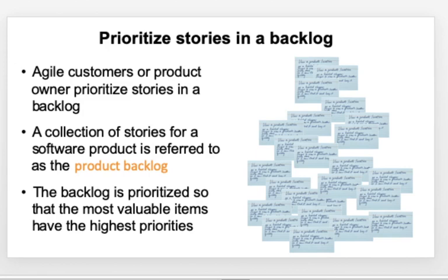So after you have written all user stories, the next step is prioritization, because all of the user stories that you write go into what is called a product backlog. I have mentioned it is a bigger bucket, so you will not be able to pull out all items from the bigger bucket in 2 to 4 weeks time.